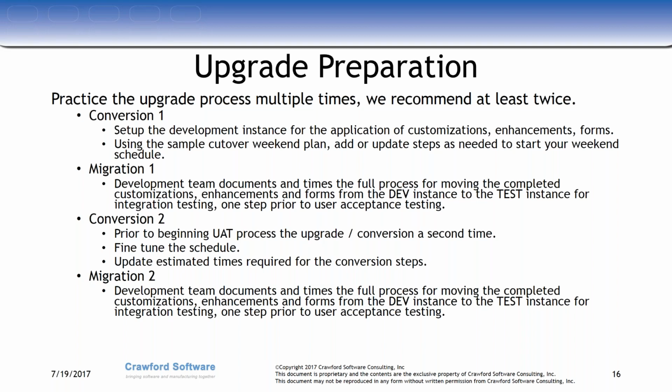That's also, after we've done that, we do all these modifications. As we're moving these solution packs that are coming out from the upgrade customizations and everything else that we're doing, we want to time them. We want to note what the solution pack is, how it's stored, where it's stored, size, time to migrate it, time to apply it, any manual changes that went through to accompany it. That's all leading up to, ideally, if you can, and the project timeline allows it, we want to go through the conversion again.